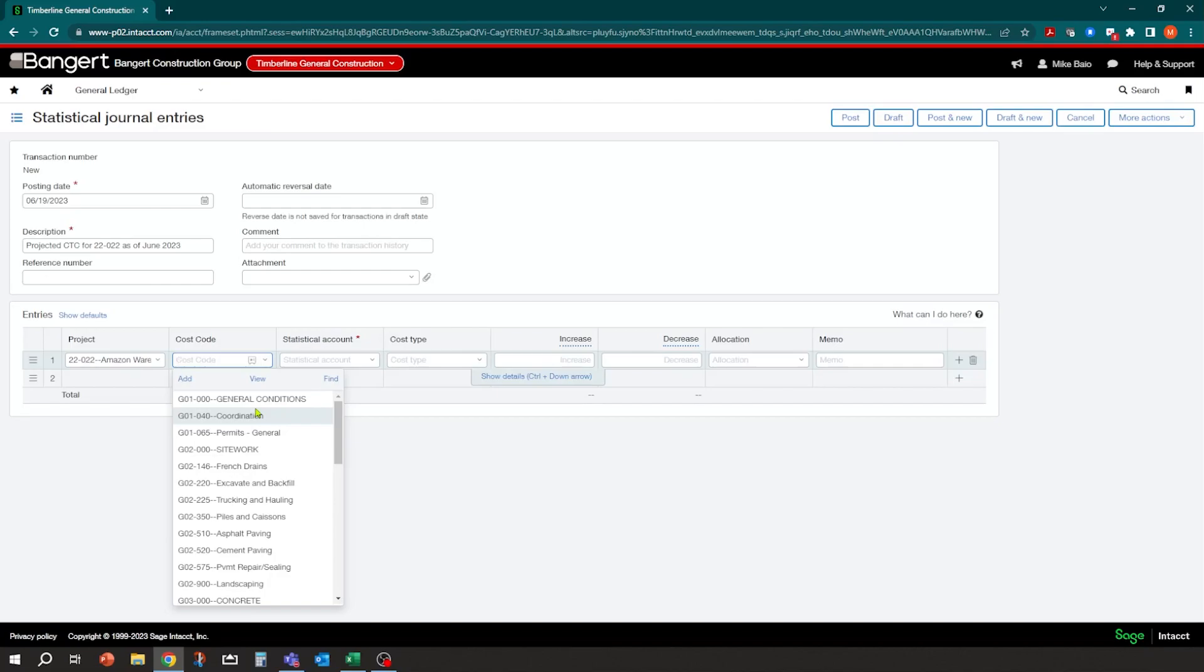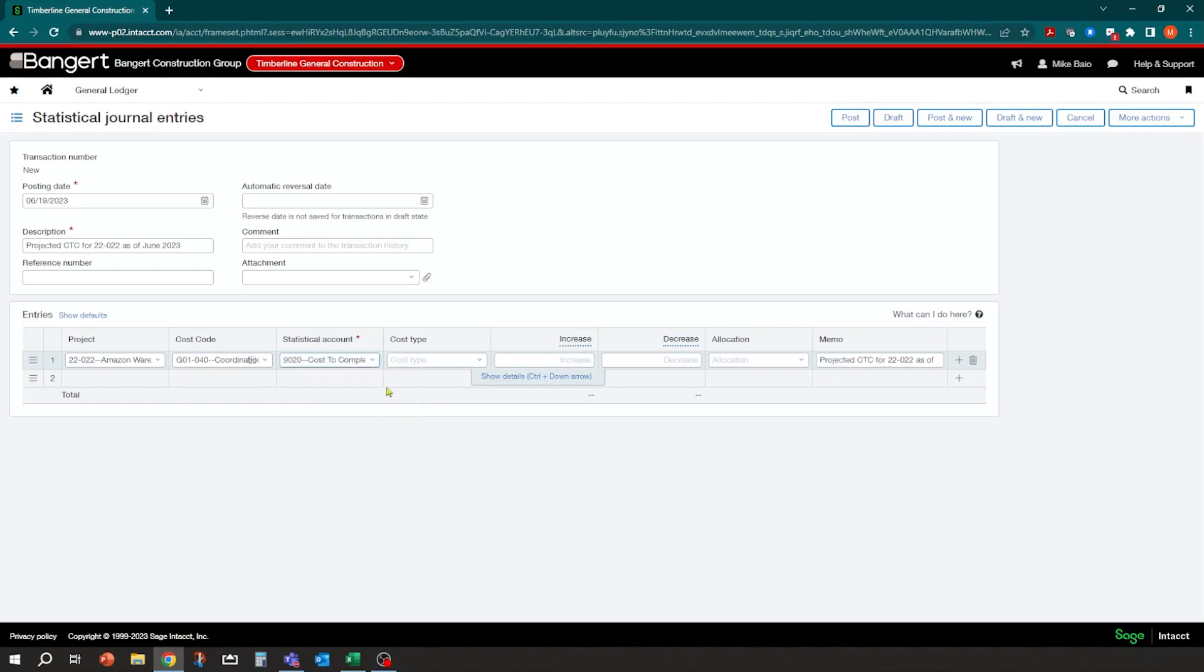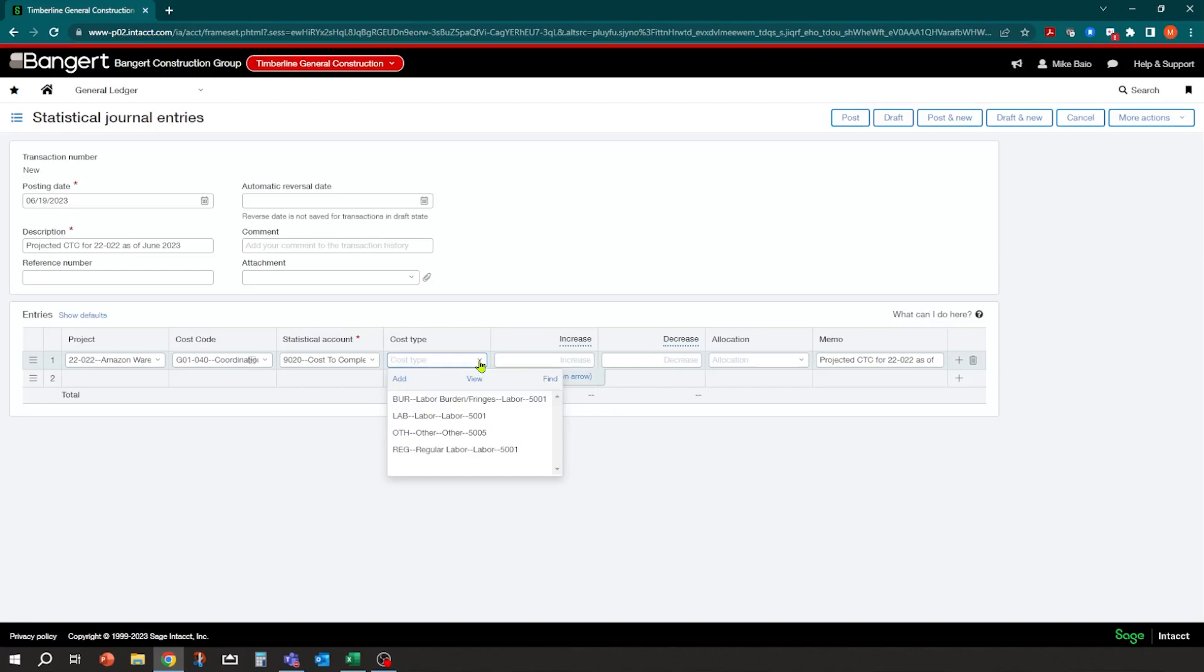And you can come into here and say for coordination. Now there's my statistical account and I'm going to say I'm doing the cost to complete. And then you can elect at what level you want to do your projection at. In this sample, I'm just going to do it based on project and cost code. I don't want to have a projection for each cost type, but you could. You could say, here's my projection for labor. Here's my projection for materials, depending on which cost code you are on.